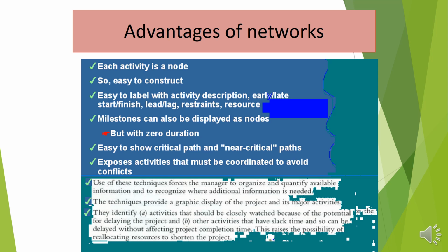Networks identify activities that should be closely watched because of the potential that they have to delay a project. Other activities have slack time and so can be delayed without affecting the project completion time. This raises the possibility of relocating resources to shorten the project.